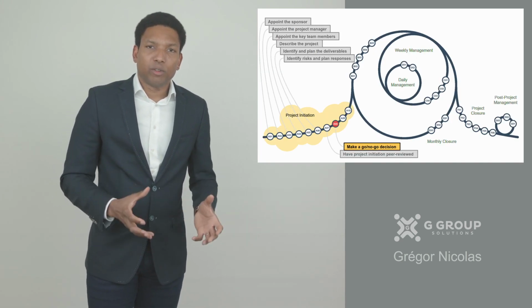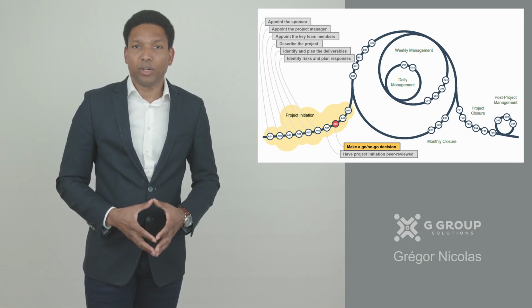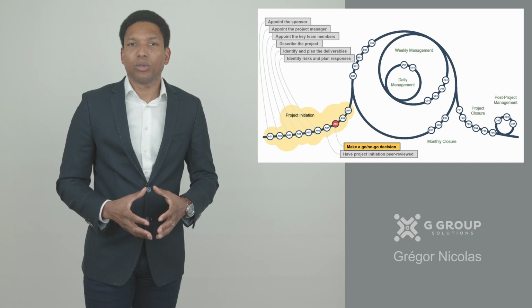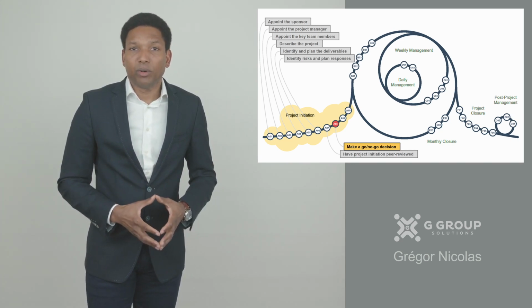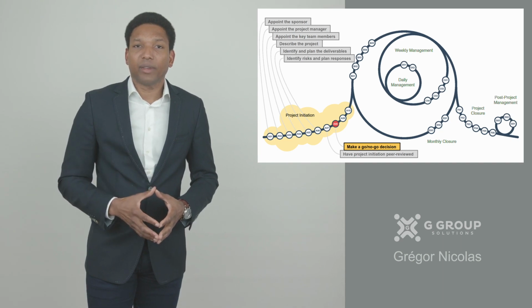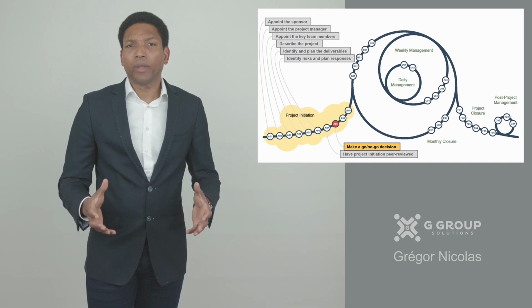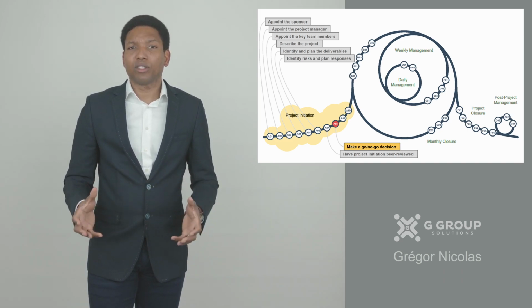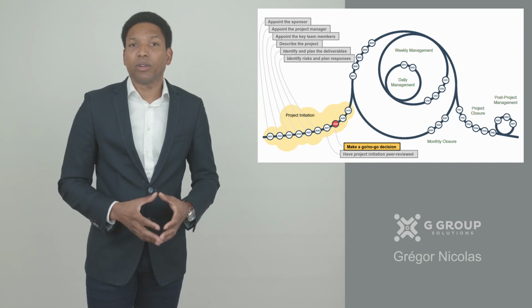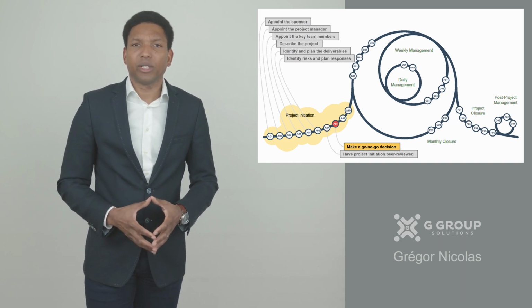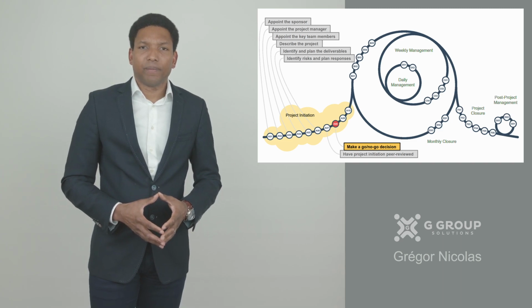It is the responsibility of the sponsor to decide if we go on or we don't go with this project. The sponsor will be in touch with different people at high-level decision-making, and they will decide we can go with this project. Remember, this is the part where, if you have to sign a contract with an outside client or outside stakeholder, this is the time where you will sign the contract and say, we can go on with this project. Then you move on to the communication section.